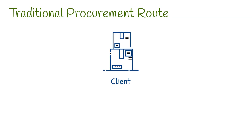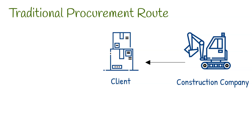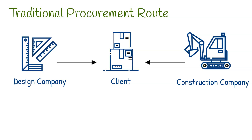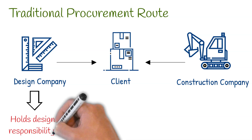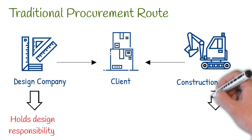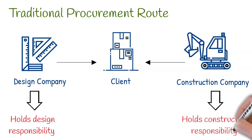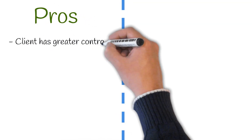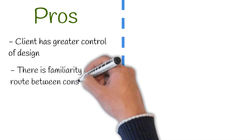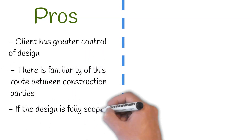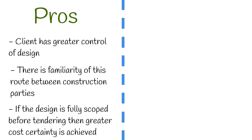Under this method, an employer would engage a contractor to carry out the construction of a project in accordance with the design produced by the employer's professional team. Throughout the construction, the client's design team holds responsibility for the design, while the contractor holds responsibility for the construction. Pros to this route include: the client has greater control of design, there is a familiarity of this route between construction parties, and if the design is fully scoped before tendering, then greater cost certainty is achieved.